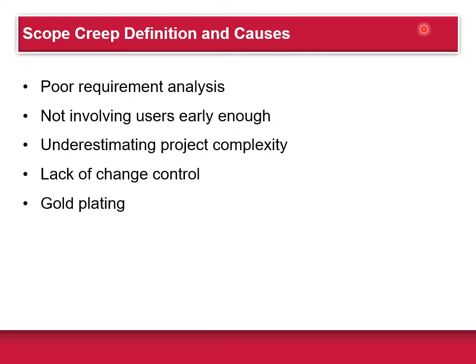And finally, gold plating. Gold plating refers to adding extra value to the project that is beyond the scope of the project. This is very common on software projects where developers add features that they think the end user will like, but they're not necessarily needed.